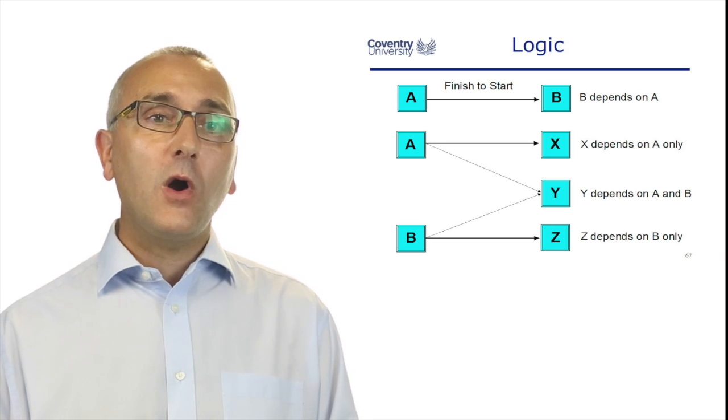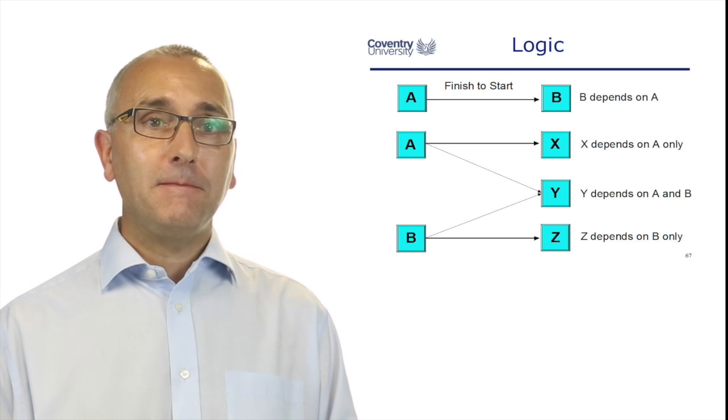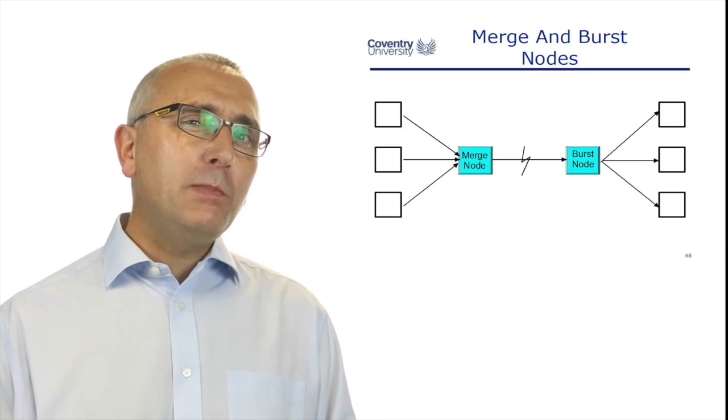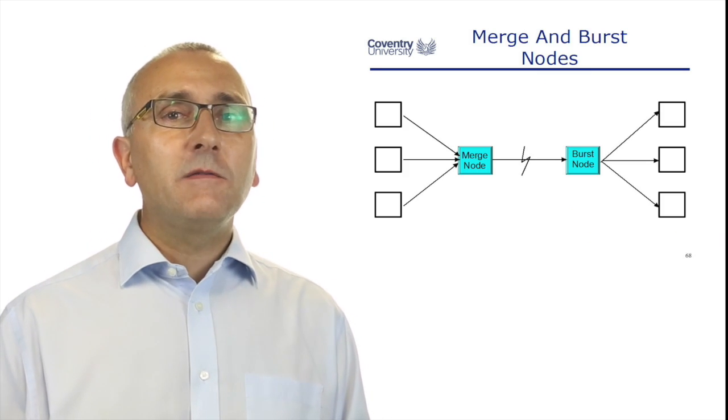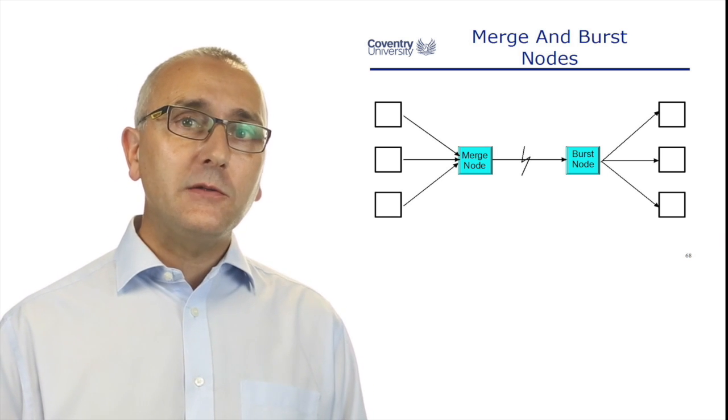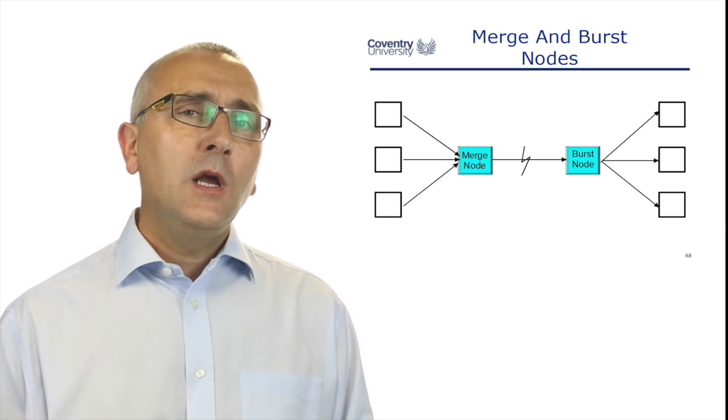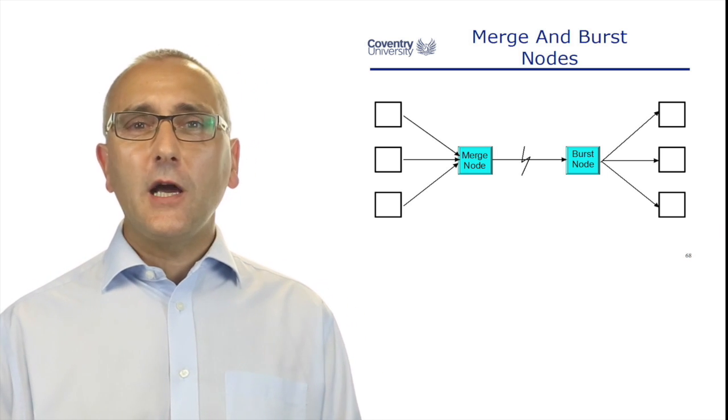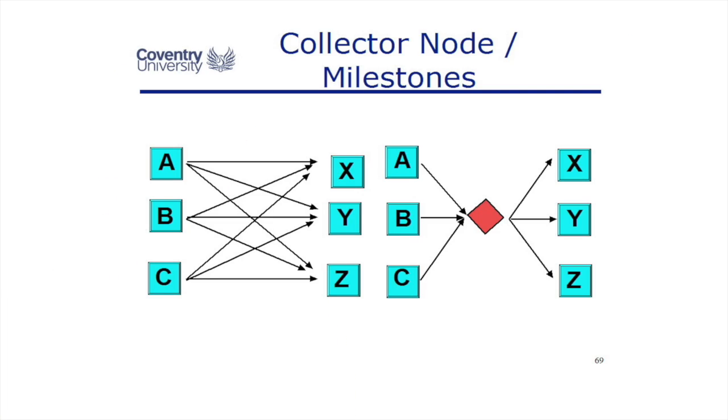You could create very complex diagrams, and as we shall see, one way of doing this is using post-it notes and whiteboards. You sometimes find that the dependency lines get all over the place. In this example, X, Y, and Z can't start until A, B, and C is finished. If we look at it, X can't start till A, B, and C is finished, Y can't start till A, B, and C is finished, and Z can't start till A, B, and C have finished.